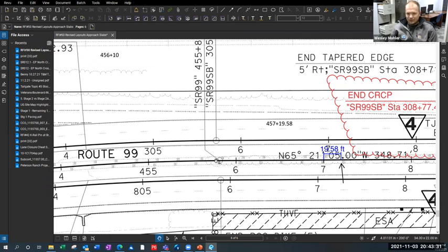And another thing I should mention with civil construction and bidding: in a building, you'd use a lot of framers and carpenters and masons and pipe fitters, right? And rod busters. Those are all different trades in vertical construction. But out here, you don't have as many different trades. You have operators and laborers. Those are the two big ones. And if you're doing structural concrete work, you'll have masons. And then sometimes you'll have rod busters if you're doing concrete paving. But those first three are the most common. You don't have as much handwork, so that goes hand in hand with the excess of equipment.